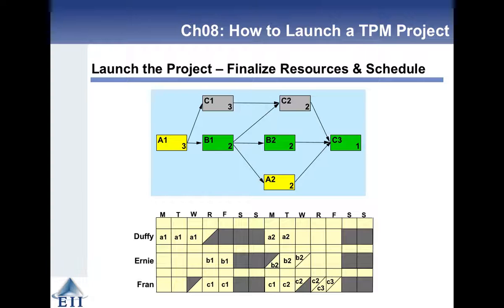So here's the network diagram now, but now we've decided who's doing what and when, and you can see that we've tried to keep people's Saturdays and Sundays free, and then there's a little bit of slack at the beginning and end where some of these squares are half coloured for people.